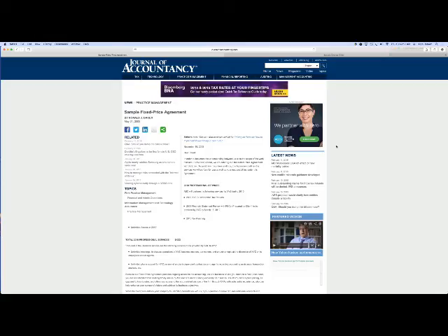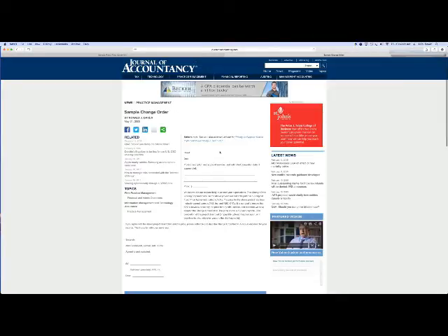And let me show you a change order. Again, this is from the same article. It's one of the 11 exhibits, and this is just a very simple change order. Client's name, the date, the project description, and the scope of the services, estimated completion date, the price, and then just an explanation of, hey, we use change orders, Mr.